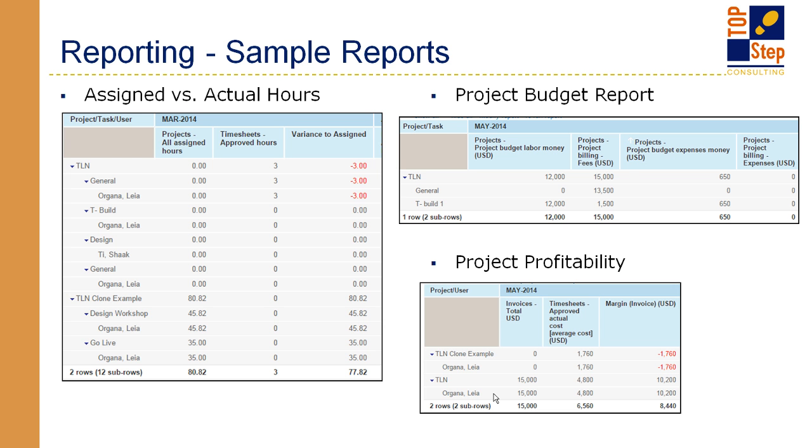And I did project and user. A lot of people just do this at the project level, just for a quick, what's my margin on my project, because that's really what you're looking for. Also with a margin percentage, because you're kind of looking at a specific target. I know a lot of services projects will target around the 35% mark. So they want to make sure that their projects are running on track, or if they aren't, find out why in a quick view.